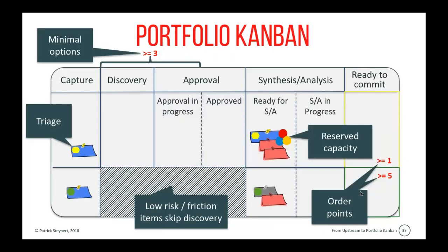So practically, if we put it all together, this turns into the upstream part of the portfolio Kanban. So we see the different steps: capture, discover, maybe some approval step, some design in terms of synthesis and analysis, and then the requests are ready to commit. At the level of capture, we do triage.